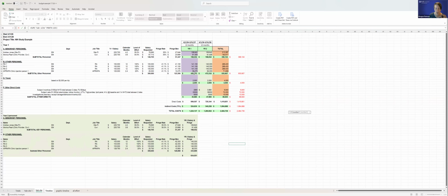And then the F&A, facilities and administration, or your indirect cost, that rate varies based on institution. It's federally negotiated, so that changes based on your institution versus if you have a subcontract. And then Opwe mentioned reiterating that salaries and prices go up, and you're often stuck with a fixed budget. So you need to talk with your department leadership to make sure you can successfully complete what you're saying you will complete. Cliff or Opwe, feel free to comment more on this.